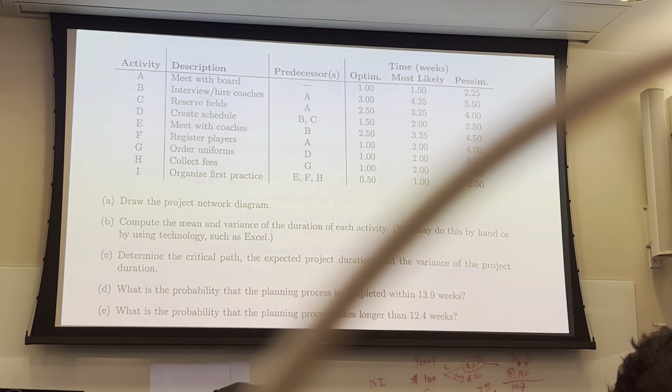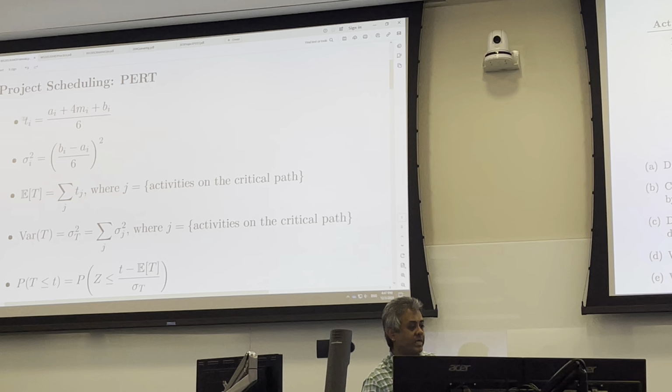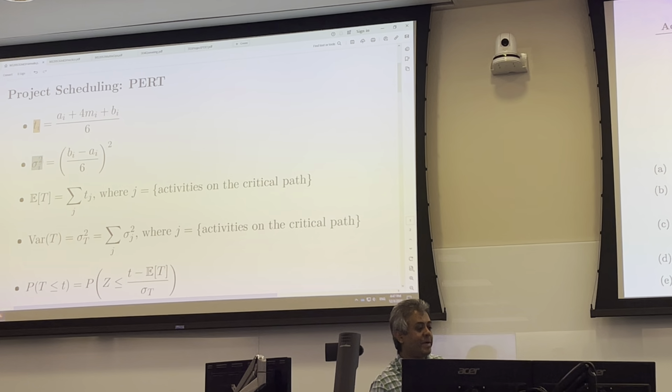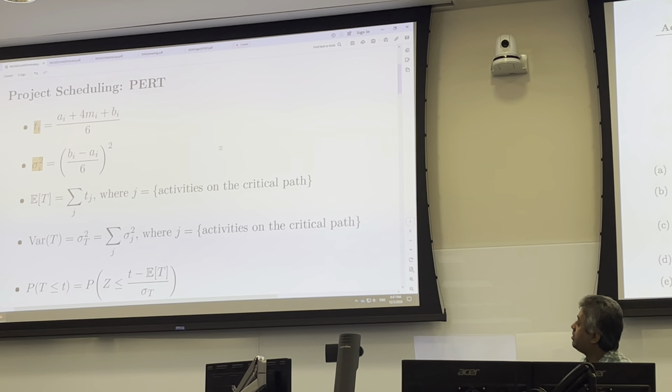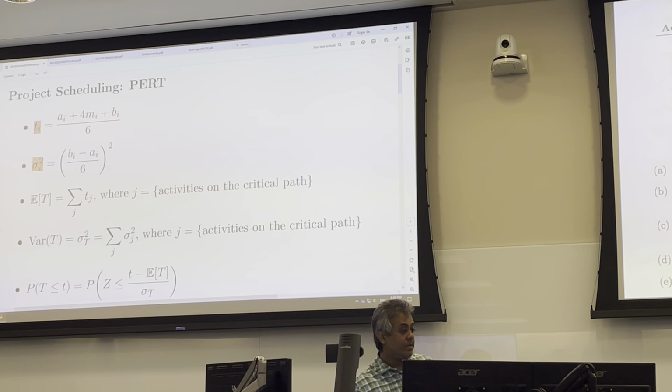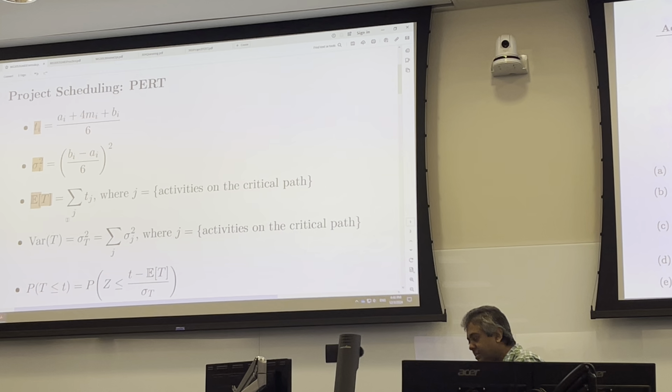Is the formula for these gonna be on the test? Yes. Look at the top of page 1 of the formula sheet. We have the formula for the expected time for each activity, and the variance for the activity duration. We have those two formulas given, similar to part B. And then remember, the expected project duration is just the duration along the critical path, using the expected times.